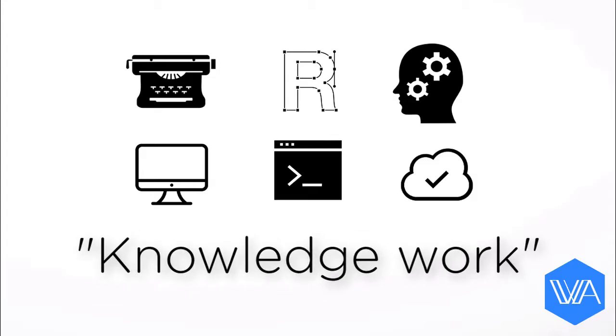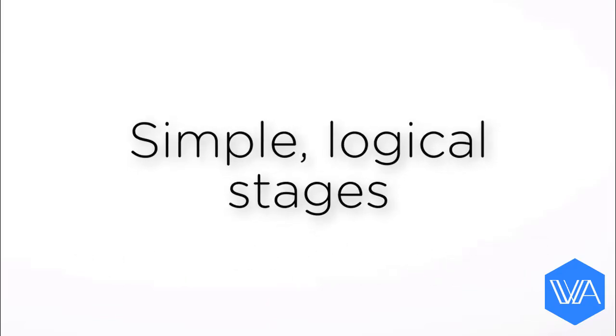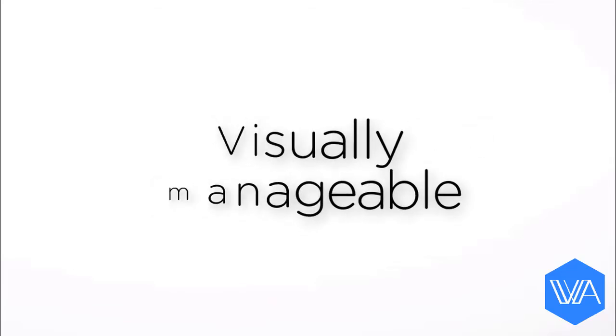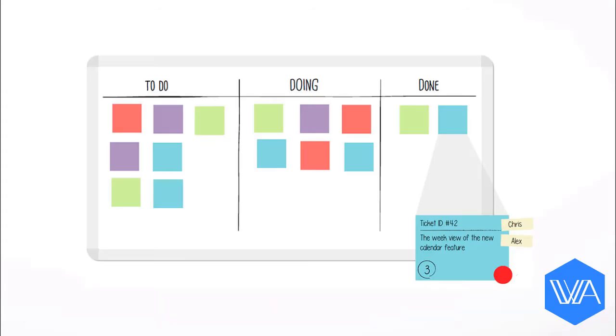of knowledge work. At its simplest, Kanban logically organizes tasks according to stages or categories so that we can focus on individual tasks in bite-sized chunks. Here's what a typical Kanban board looks like. Generally, one's tasks start on the left under To Do and make their way through any stages that you've got set up until they're done and they're all piled up on the right-hand side.